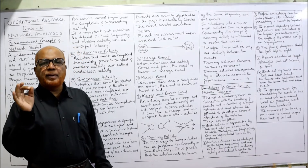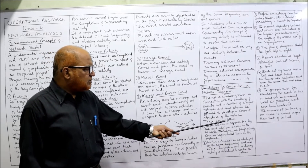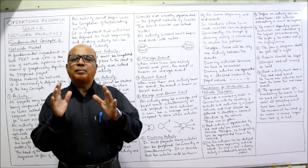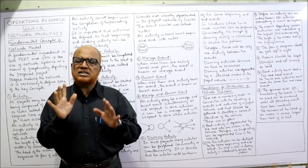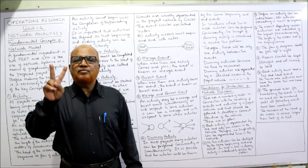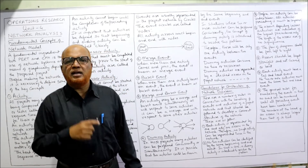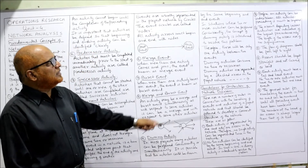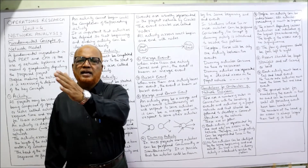Guidelines for construction of a network diagram: some rules must be followed while drawing a network diagram. First, each activity is represented by one and only one arrow in the network — no single activity can be represented twice; one activity, one arrow. Second, no two activities can be identified by the same beginning and ending event; if two concurrent activities exist, we must use the dummy activity concept.